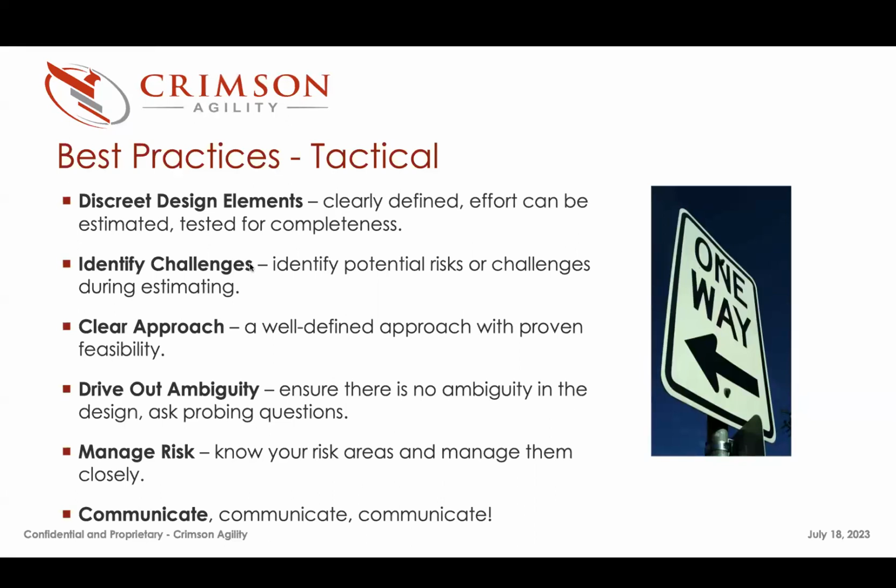Identify challenges. Look at the statement of work. Identify what areas you think are going to be the most risky, which are challenging to estimate. Maybe the developers are telling you they have medium confidence in estimating a task.